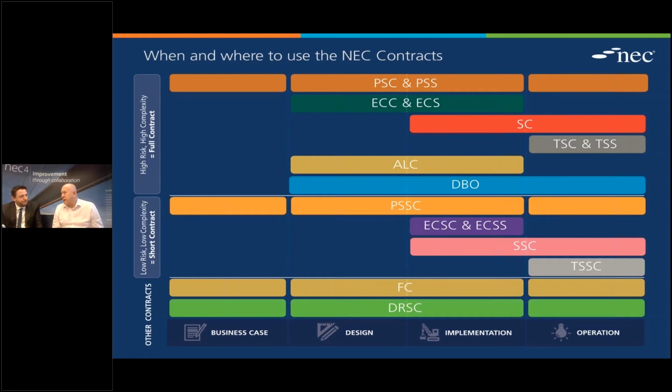So in the client side, I always say get to have a project risk register. Do your risk management around conception and inception stage of a project. Look about avoiding, reducing, mitigating risk. Same process for the contractor. Absolutely. So they start at receiving the tender documents. So you start looking at the risk associated with all of the subcontracts, with your delivery of the work. How you're going to avoid, reduce, and mitigate it. And the contractor's own version of the project risk register will help them decide the level of risk and the degree of sophistication required in managing the subcontracts.